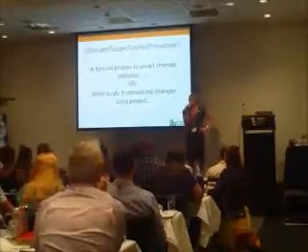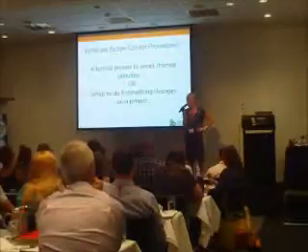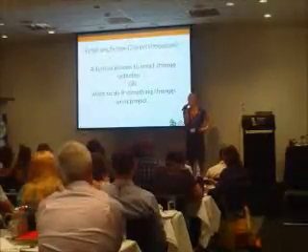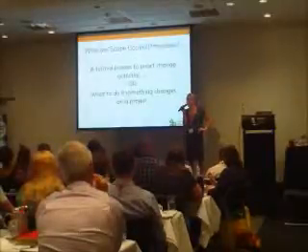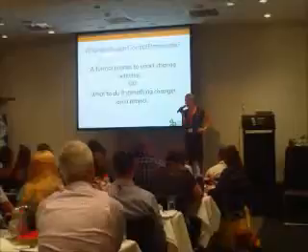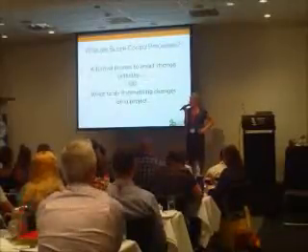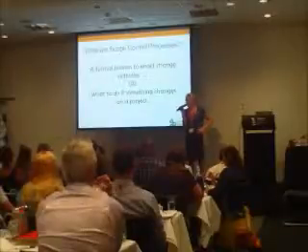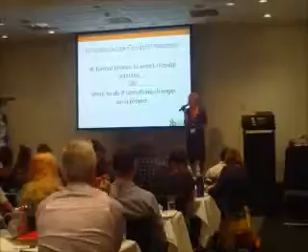Discuss with other people. Yes, so there's some communication. Find alternative options, solutions to the problem. Yeah. Go back to your planning and see how it impacts. Look at the impact on your planning in terms of scheduling and in terms of budget and in terms of every other aspect of your planning as well. Your procurement, your ordering times, your lead times and so on.